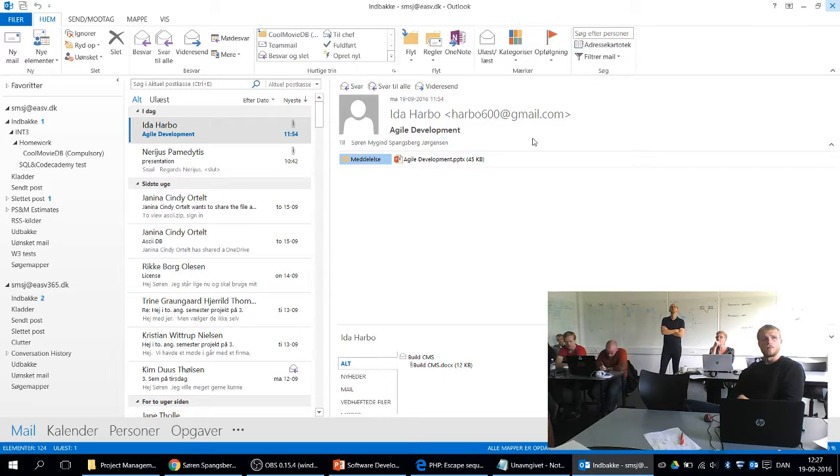Now, when you start doing Scrum, the first thing you need to do is, of course, get the requirements list. But once you have it, you can then do what is called a product backlog, which is essentially a wish list. It is the biggest list that you're going to be working with throughout this product, and it is all the things that you want and can do. Now, what you do with it then is you transfer it into a release backlog, which is kind of the same thing, except now everything is structured a bit better, and the different points and tasks are sorted after priority. So that way, when you start working, you always get the most important things done first.